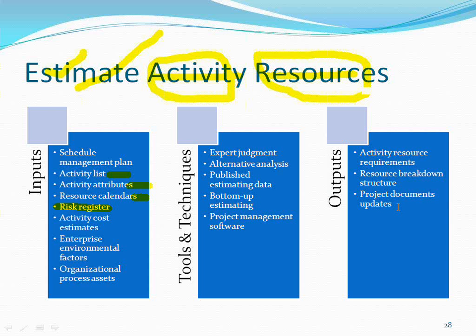So at a higher level, you may not be able to estimate how much time an activity will take. So when you are not confident, when you are not able to estimate, you further break down, subdivide that activity into smaller chunks. Then you do estimation from bottom. So from bottom to top you are doing the estimation. So it's called bottom up estimation. If it is from top to bottom, it's called top down approach, top down estimation. Here you use bottom up estimation.